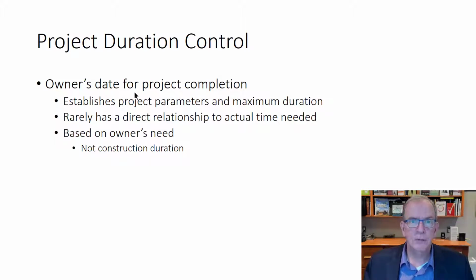You know, if the owner keeps making changes and the finish date is the main driver, then they have to be explained the impact these changes are having on the schedule. How do you do that? You insert a change into the schedule and you see the impact it has on the schedule. So there's no denying it that way.